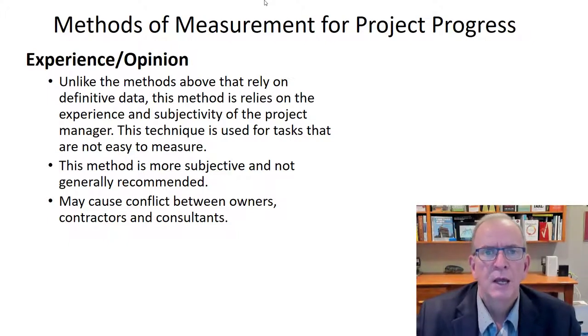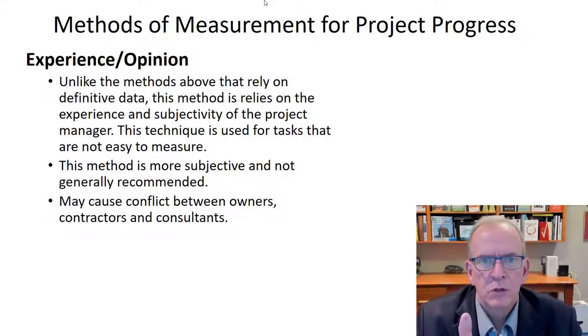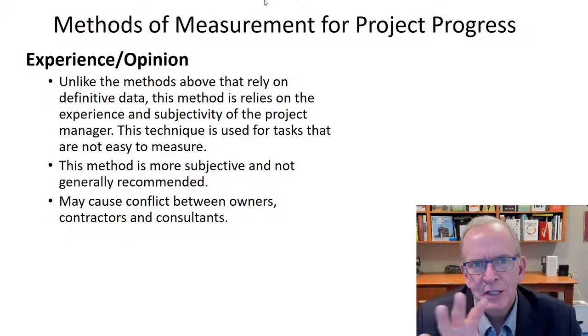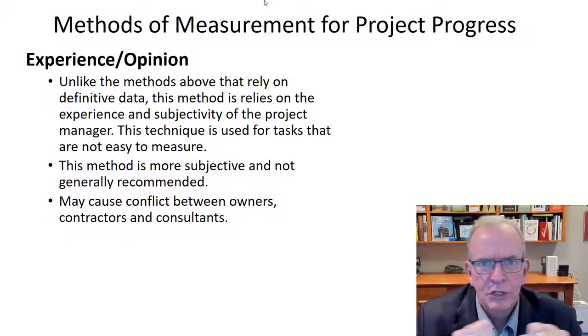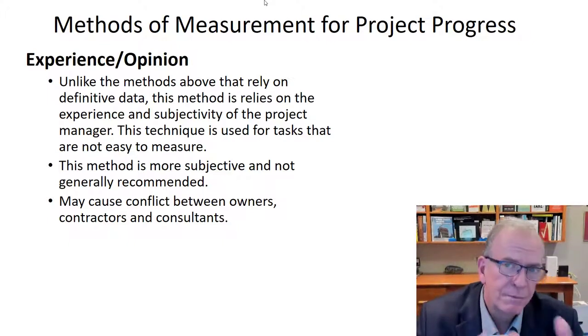Now, if you've broken the activities down to smaller amounts, then it's going to tend to be more accurate, because you're only going to have so much that isn't finished. When things are finished, it's finished. So you had that cost, or you have whatever the costs were for that, and you can attach that to it and then compare that to the budget amount. So that's okay, but it's more for the things that are, this is a third finished, this is half finished, or is this 75% finished?